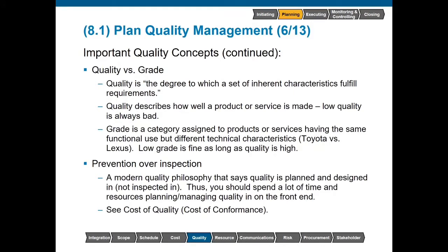Quality versus grade are concepts that are often used interchangeably, almost synonymously, which is incorrect. For the purpose of the exam and within the PMBOK, quality is the degree to which a set of inherent characteristics fulfill requirements. Now, if you tell me that you're trying to cook a stew and you need carrots and potatoes and onions, and I go to the store and get you carrots and potatoes and onions, then that would be high quality. I am fulfilling the requirements that you've given me.